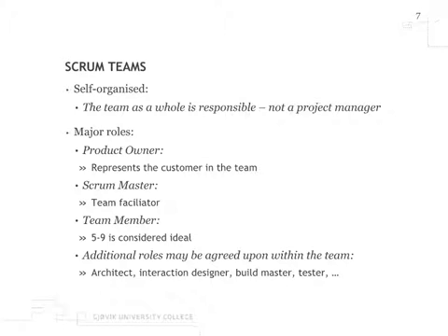You have a Scrum Master. The thing with the Scrum Master is he's not a project manager, he's a team facilitator. So he administrates everything that needs to be done, maybe plans the meetings, sets up Scrum daily meetings, maybe leads these Scrum daily meetings as well, but nothing more than that. And maybe he actually participates as a developer or designer or something like that in the Scrum team as well. You have teams where somebody shares or has different roles in the same team.